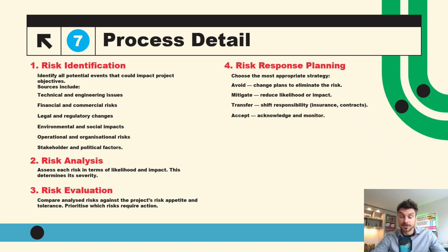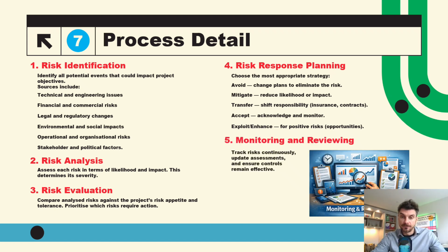Accept, so acknowledge and monitor. And then exploit or enhance. And this will be for positive risks or opportunities. Monitoring and reviewing. So the final step, where you would track risks continuously, update assessments, and ensure controls remain effective.